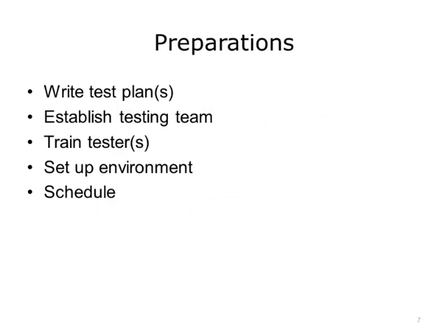It is important to prepare for the testing process. The steps to prepare for testing include writing a test plan, establishing who will test, providing training for testers, setting up the testing environment, and scheduling the actual test. Remember that the test will need to be repeated numerous times.